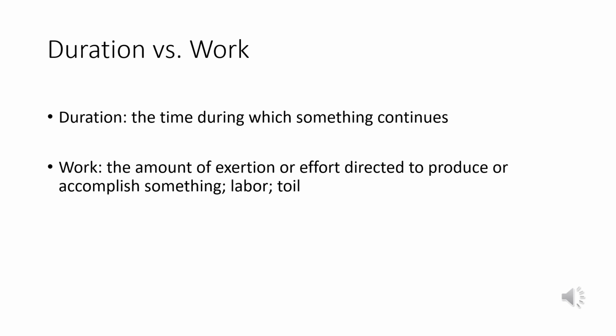and we'll assign somebody else. They can do the trees. You should be able to cut the amount of duration in half. Same amount of effort, just split up amongst different resources. It's a subtle difference, but it's a difference still. It should be kind of like common sense.